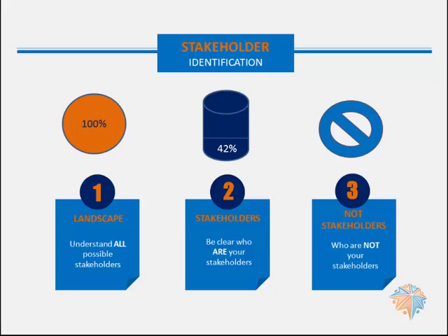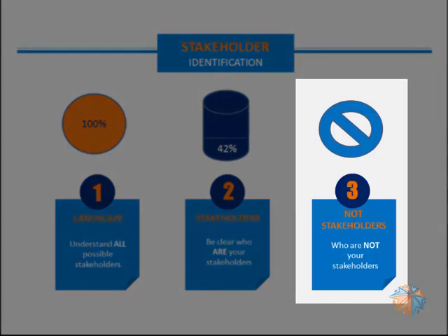Once he was clear on who he thought his stakeholders were, he then knew that he had to do the next step. Actually do an assessment and understand who his stakeholders are not. It's really important that you go through this step because then you'll identify who the other people are in the organisation. Because although they may not be impacted or directly involved, they could be a strong supporter of you or of the cause, and any advocate is going to be a huge help to you in undertaking your project.